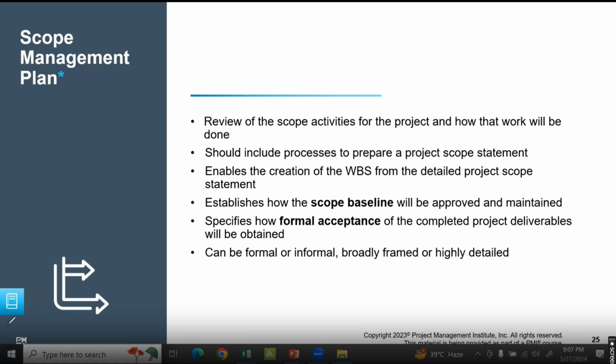And that is further broken down into WBS, which is work breakdown structure, where you have all the work broken down to the smallest unit of work, which is called work package. Work package is the smallest unit of deliverable, which cannot be further broken down. Like I was talking about wall. Wall is a deliverable and smallest unit of deliverable, which is work package.